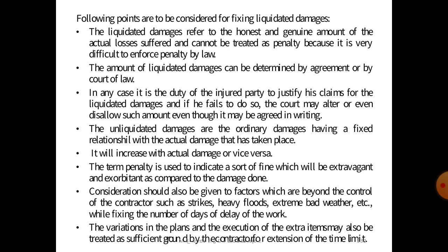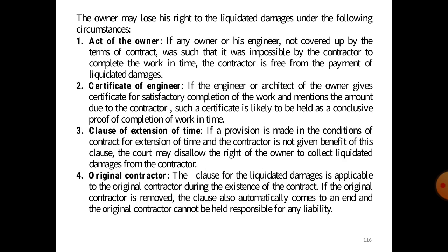Consideration should also be given to factors beyond the control of a contractor, such as a strike, heavy floods, extreme bad weather, etc., while fixing the number of days of delay of the work. The variation in a plan and the execution of an extra item may also be treated as sufficient grounds by the contractor for an extension in the time limit.